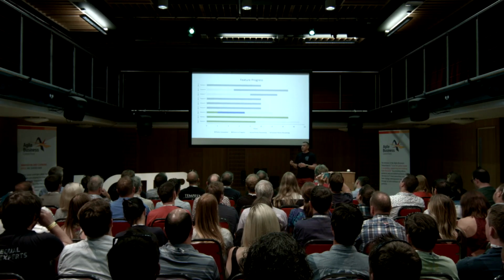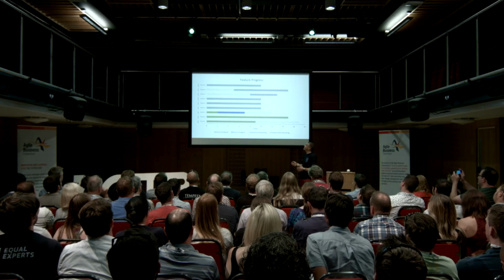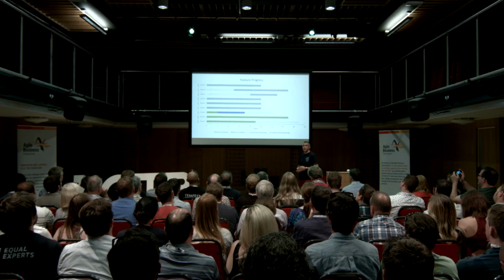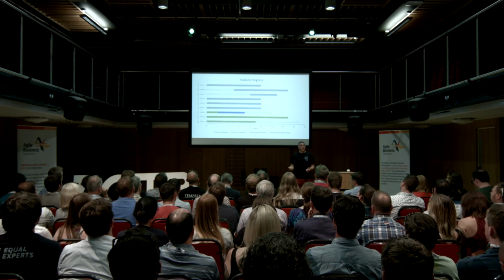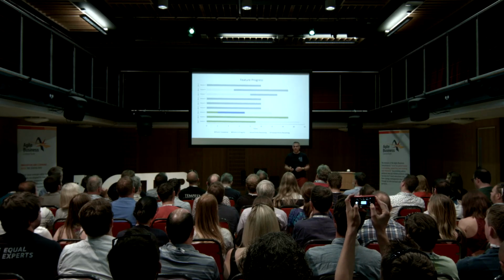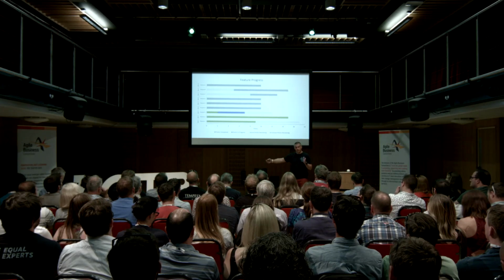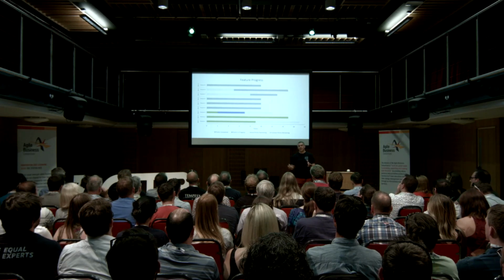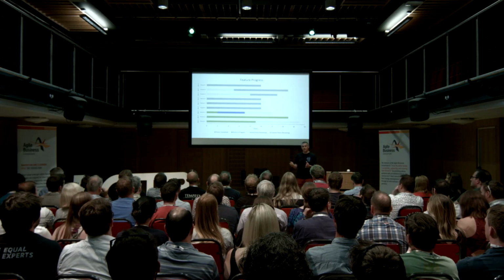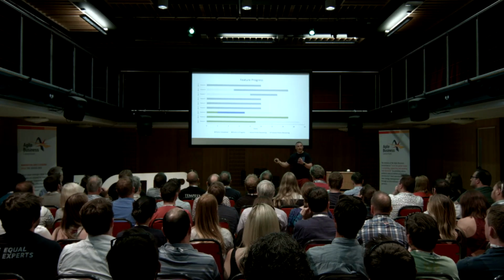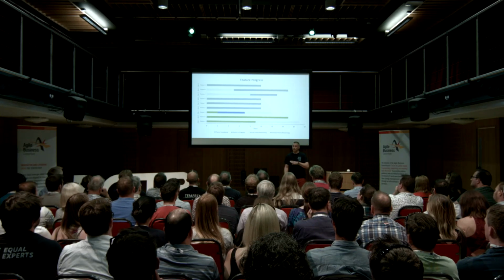If you didn't do any of this forecasting in your backlog, you would know that you've got about 8 points for feature 7, and you'd probably know that you've got some other work to do, but you don't really know how much work that is. So by adding this extra dark grey area, which is our forecast amount of work, we start to see actually it's not 8 points, it's actually 13 points. So you get an idea there's probably about half again amount of work left on top of the stuff we've estimated.